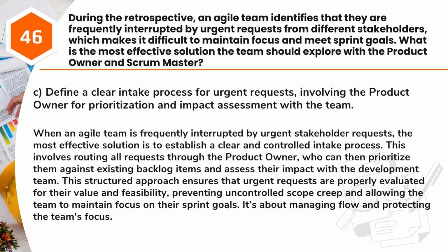their impact with the development team. This structured approach ensures that urgent requests are properly evaluated for their value and feasibility, preventing uncontrolled scope creep and allowing the team to maintain focus on their sprint goals. It's about managing flow and protecting the team's focus.